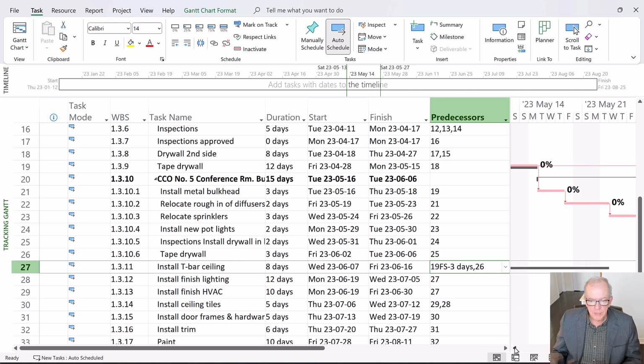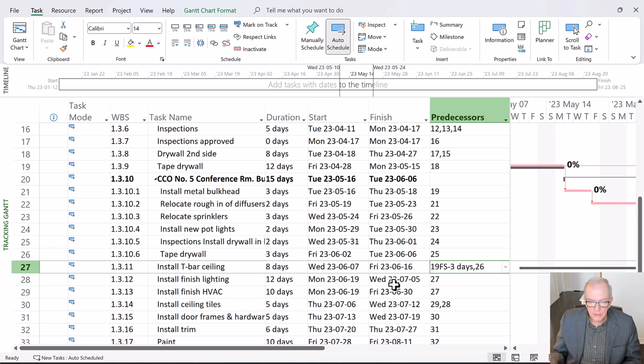So this was actually coming in, before we put this, number 26, at -3 days. So our change order is 15 days. This was starting 3 days back. And so this change order, even though it's only 15 days, we're pushing this out. That extra 3 days is what that's saying. So we've got 15 days plus the other 3 days that was with this change order. And that's why that's at 18.